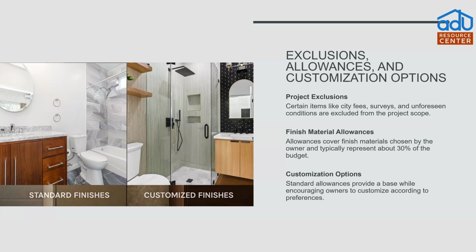Surveys. Occasionally, we'll need to have a survey done, especially if you're going to be building your ADU right up against the property line or all the way close to that 4 foot setback from the property line. The inspector will require a third-party surveyor to come out and mark the exact locations of property lines so we know that measurement was taken accurately.